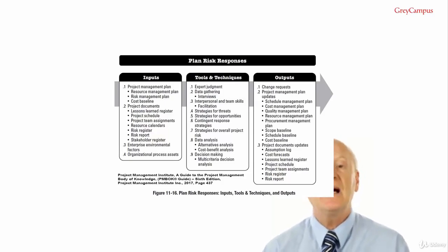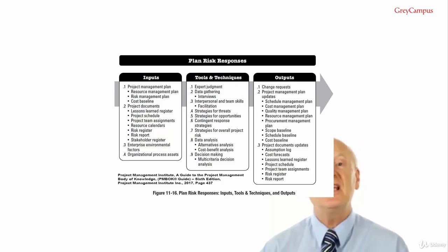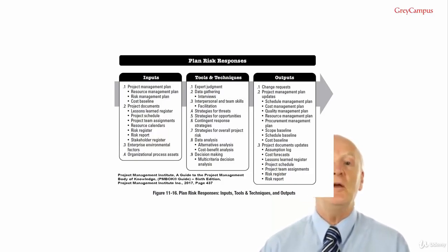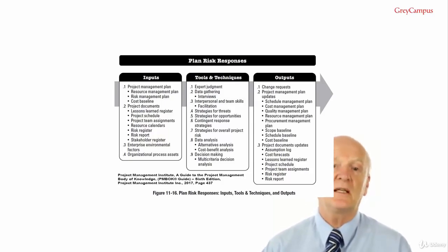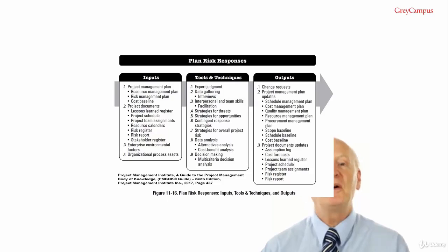And for that reason, I do disagree with the PMBOK Guide on an avoidance strategy of acquiring expertise, because even if you acquire expertise, there is a greater than 0% chance that that expert may be wrong, might make a mistake. But if that's accepted in the exam, that's accepted in the exam. But the bottom line is that if the residual risk is greater than 0%, then the risk has not been avoided.